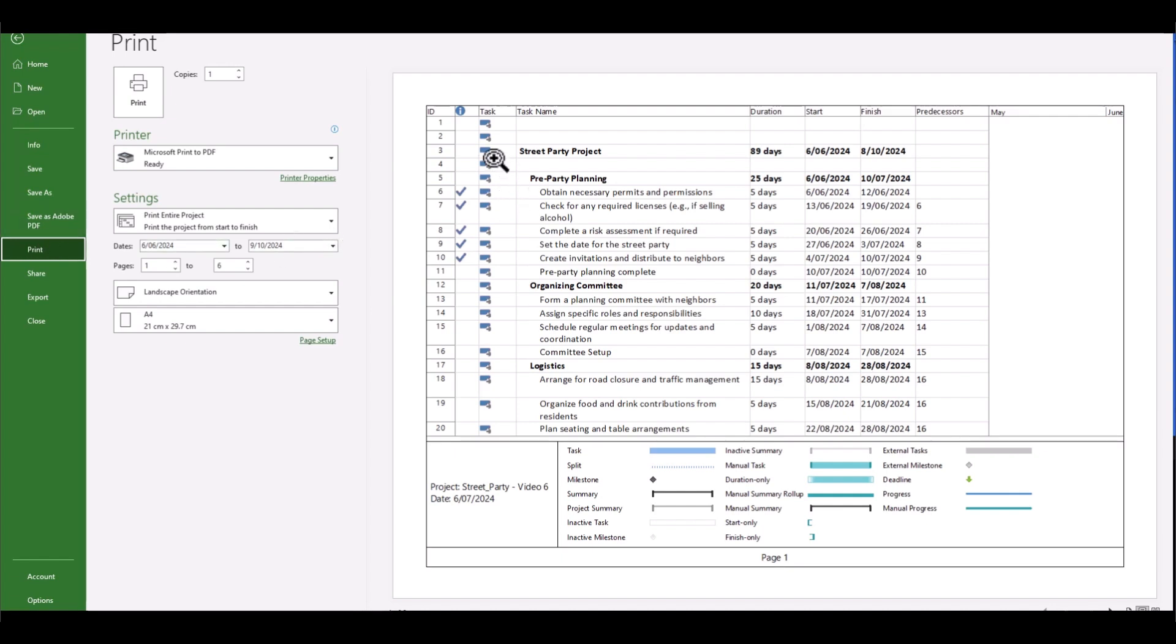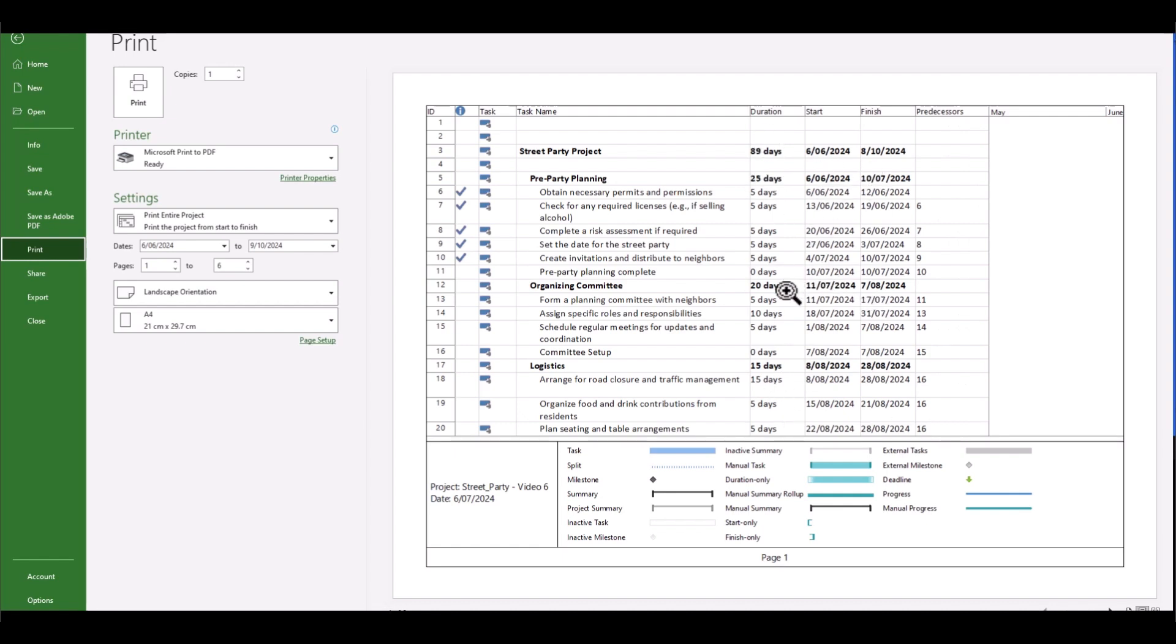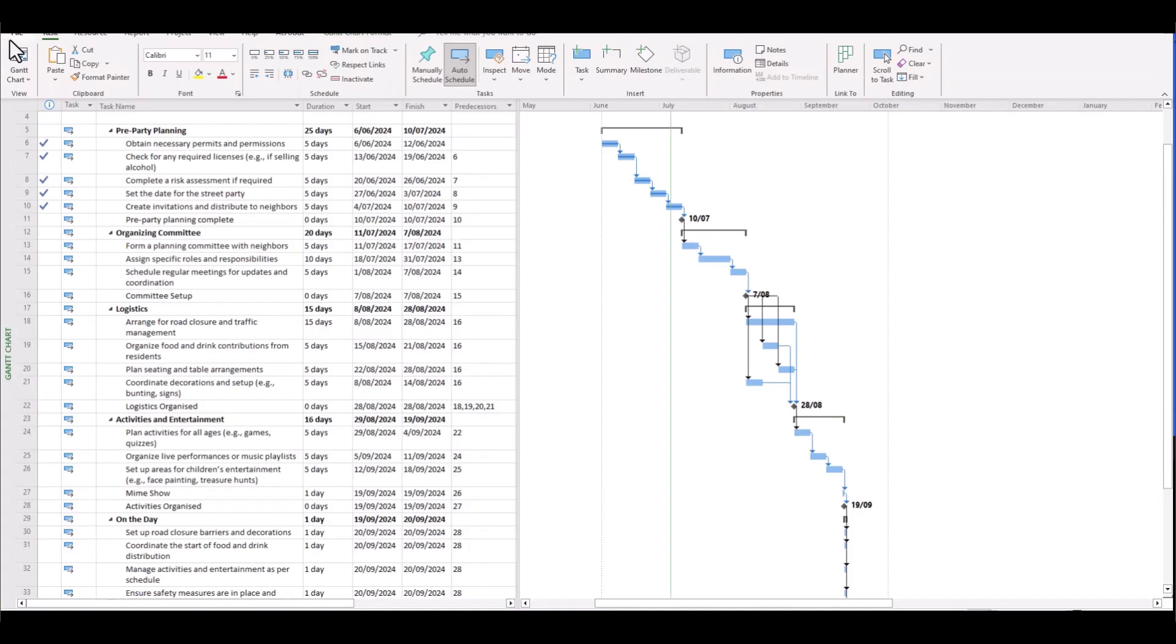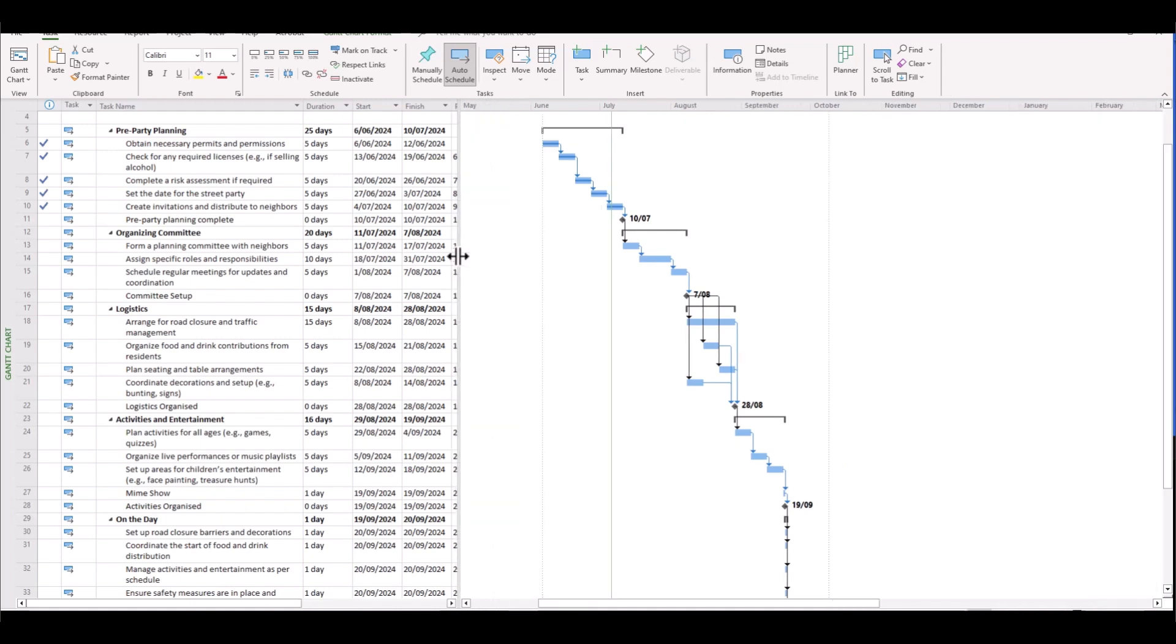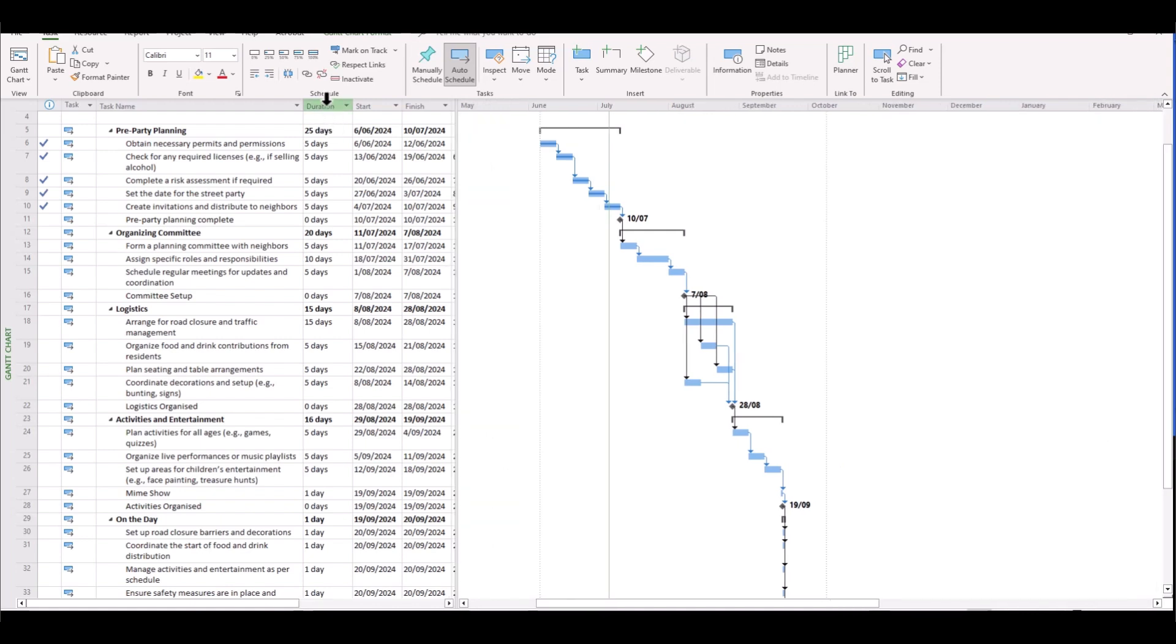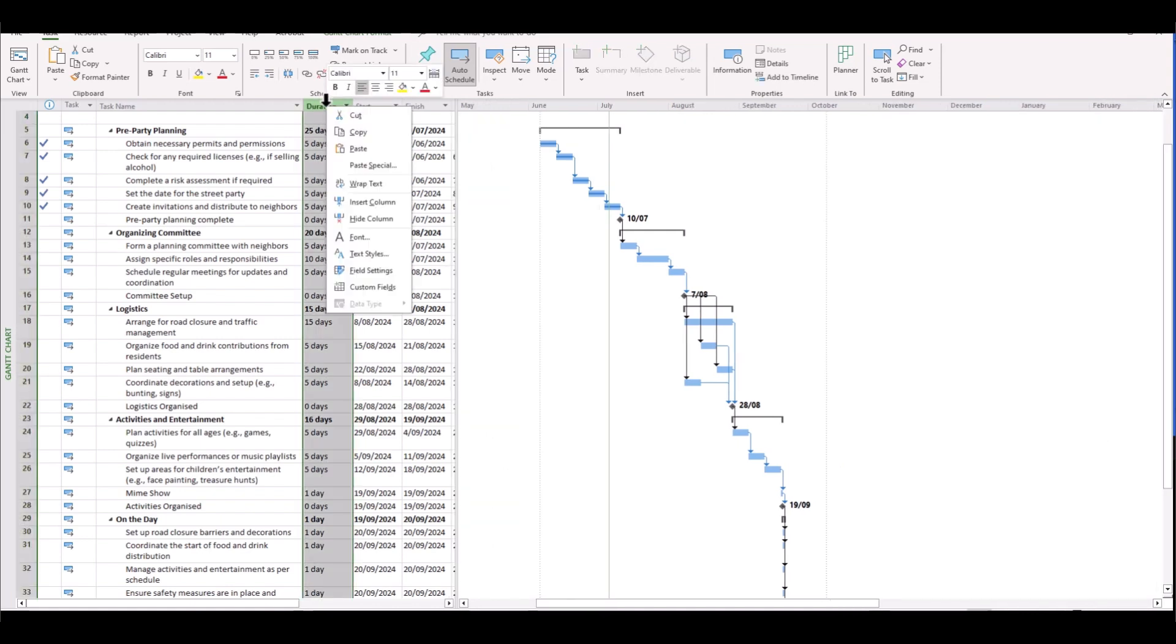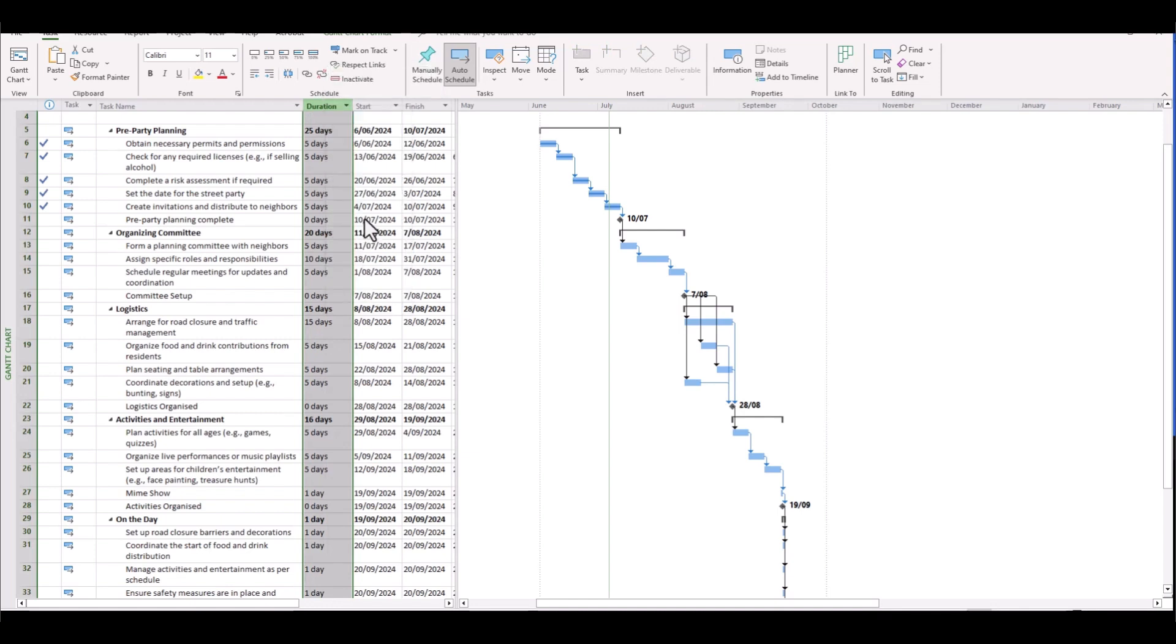Well, notice that there's a lot of columns shown here. And depending on our audience, we might consider making some adjustments to these columns. For example, our boss might not be all that interested in seeing these predecessors here. And also duration. Duration can also be derived from a start and finish date. So let's look at maybe condensing the information shown here. We can simply do this by moving our vertical line, which divides our worksheet and the Gantt chart across. And if we want to remove a certain column, simply go hide column.